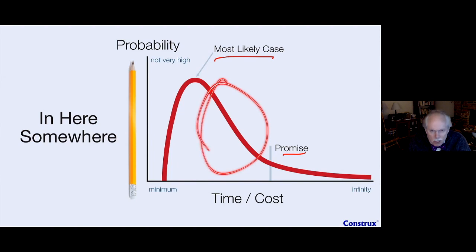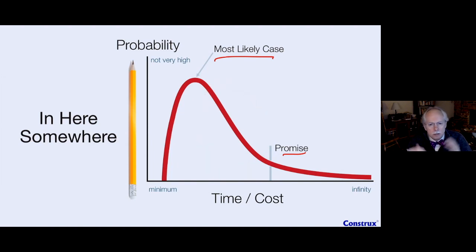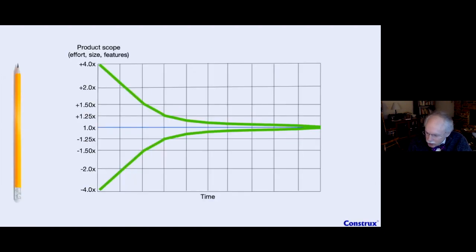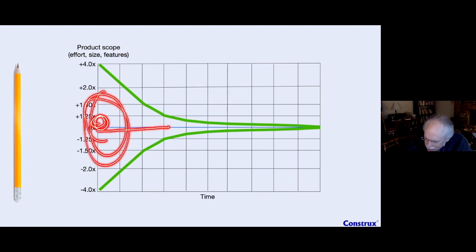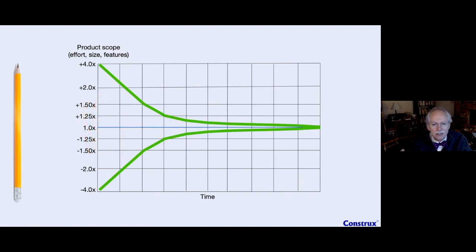But knowing it's going to land somewhere in this zone, is it worth proceeding a little bit? Because what's going to happen is, we're going to keep updating this. Let me go to my next page here. If we look at our project timeline, and I'm starting out here, I'm going to say, yeah, we're going to land in this zone. Is it worth paying enough to get to here so we can see what the zone's going to shrink to? That's the question. That's what the go, no go question asks about. Is it worth proceeding to the next check-in point?